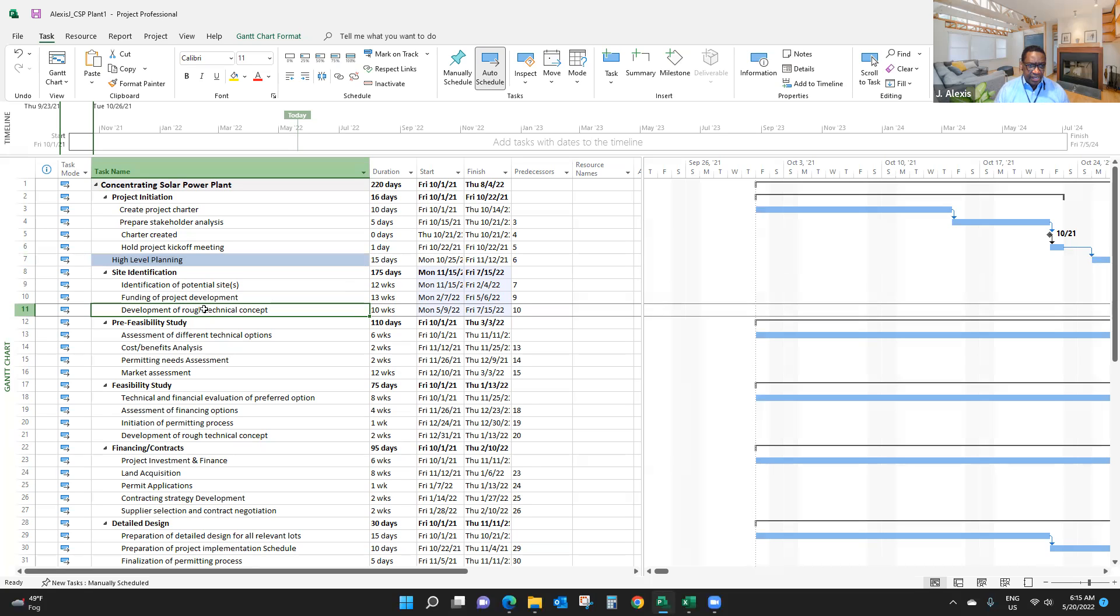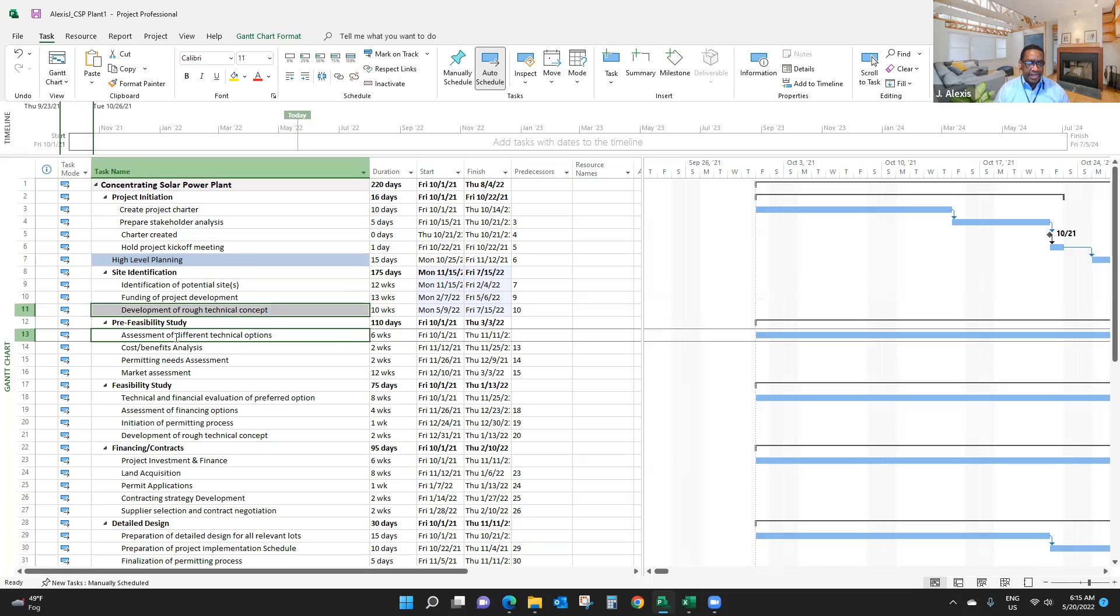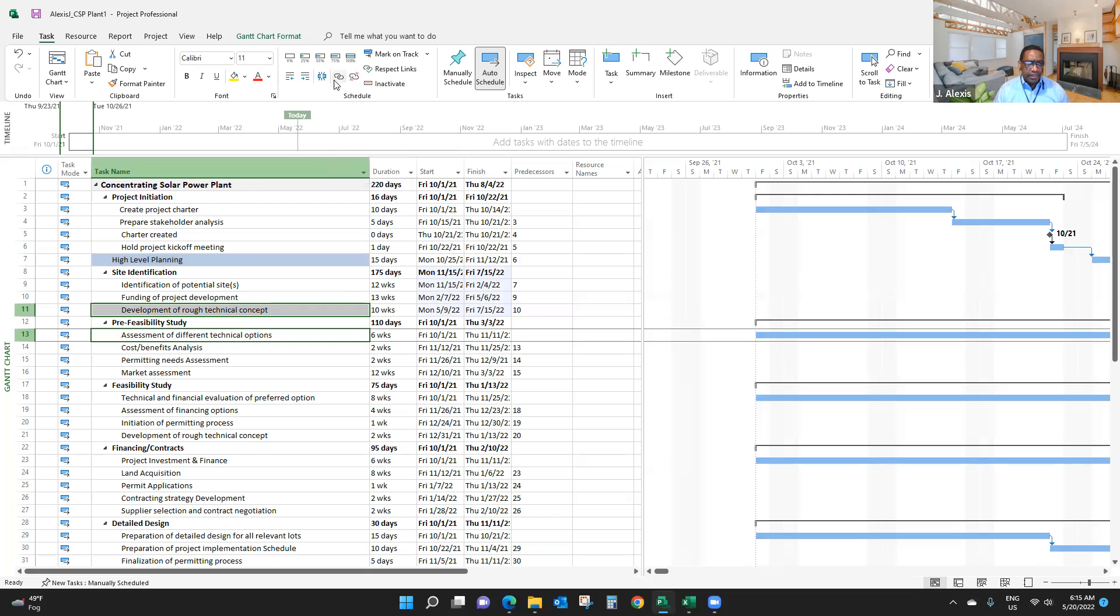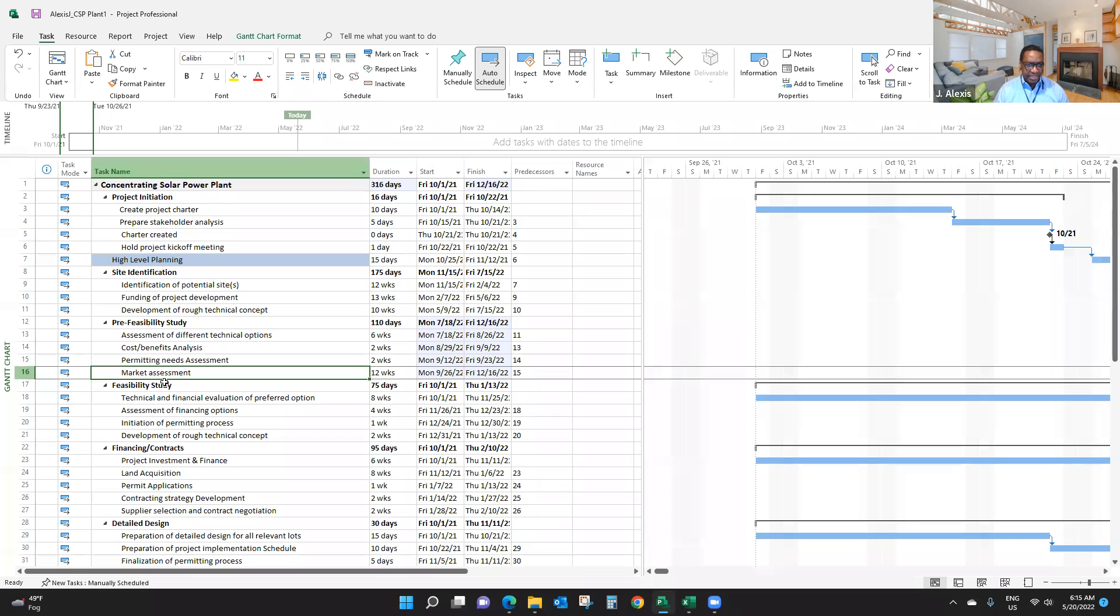I link the last item here to the first item there using the control feature or button. I select them and then link them. As you can see now, 13 has 11 as predecessor.